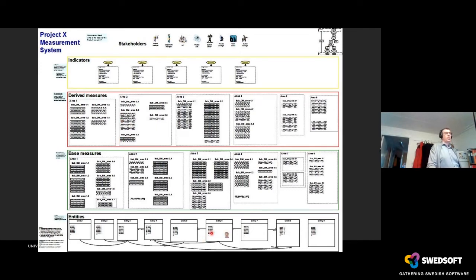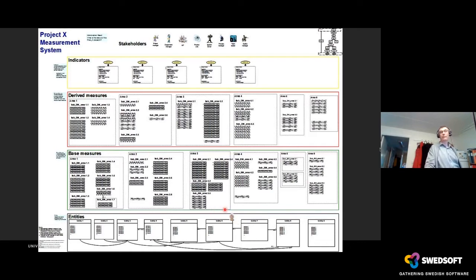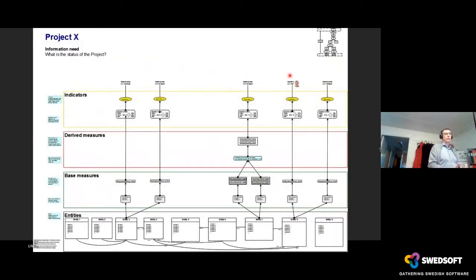I printed a few of the measures we were using on an actual A0 — one meter by two meters — paper sheet. I took it when we started a new project and went to my colleagues and said: OK, what is it you want to do now? For the first time they realized the scope of what we were measuring — especially when they realized I had only come halfway. This is how you can go from a project that had 127 measures to the next project that has just five indicators and feel much more confident.